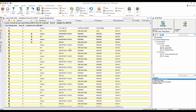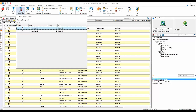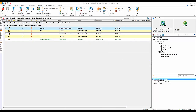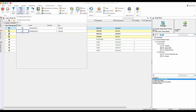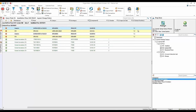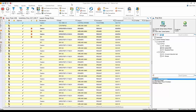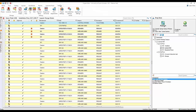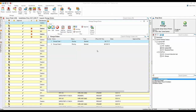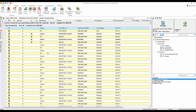There's a change order filter here. By default, we're displaying approved items — essentially the main project file — and then Change Order 1 and Change Order 2 in the list. If you just need a quick view of what's on Change Order 1, you can deselect what you don't want to see. You can also approve or reject change orders directly from the project editor. From the Settings tab, there's a Change Orders option where you can mark as approved or mark as rejected, showing only pending change orders. That's one method for approving or rejecting.